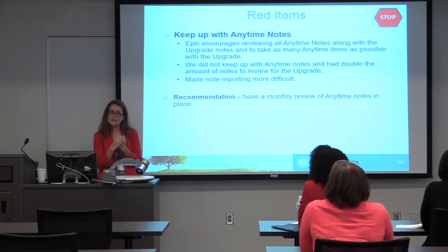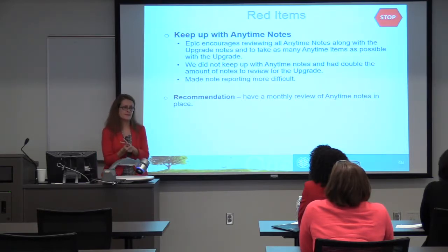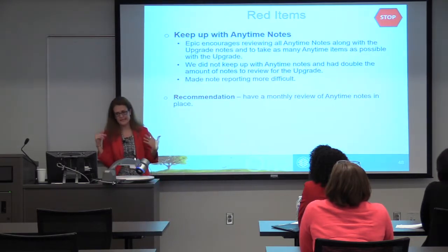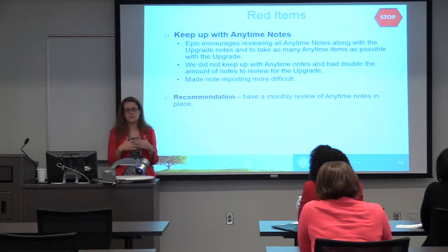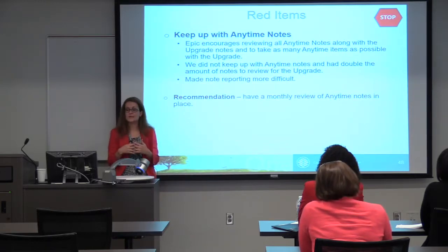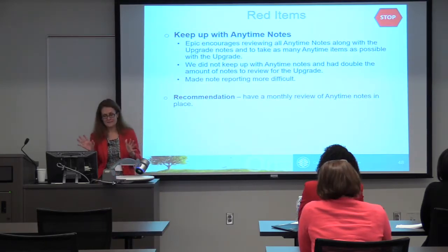Like I mentioned, we didn't do that in advance, and it caused our teams a lot of work at the time of the upgrade. Granted, they could have done it before the upgrade, but we didn't. So we basically doubled the amount of items that our analysts had to review for the upgrade. It was unfortunate, and everyone was not happy about it.